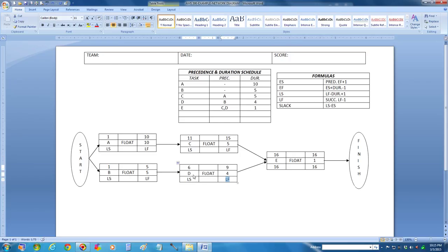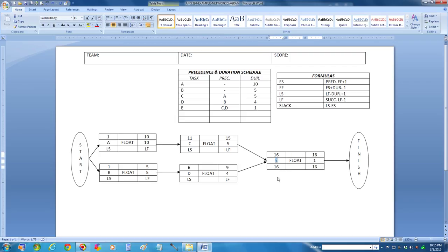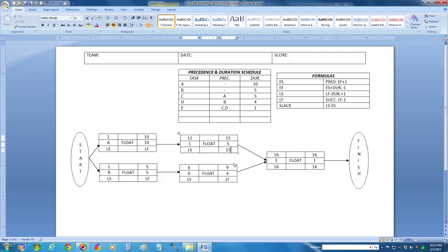What I'm trying to solve here is for activity C — we're going to solve the latest finish time for activity C. I have to use its successor, which E is its successive task, and subtract 1, which is going to be 15. So to find its latest start time, I take its latest finish time of 15, subtract the duration of 5, which is 10, and then add 1, which is going to be 11.